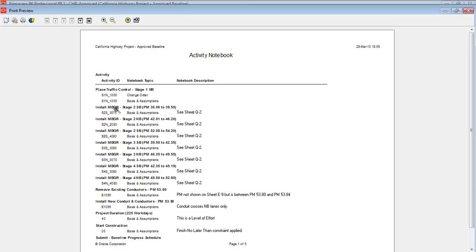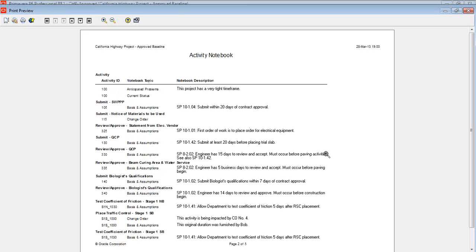Keep in mind, you only get activities listed if they've already got a notebook topic on them. I've got a few activities where a topic is assigned but nothing has been typed, so you can see it's blank. But we are getting the Activity ID, the description for the activity, and all the other useful information. Also, if you put more than one topic on the same activity, it has to add a second line to fit that information in. This is where making the font size smaller when setting up the topic will help you — some are still getting cut off. So even with 500 width, I should have made the font size the smallest possible, because it will still be readable.